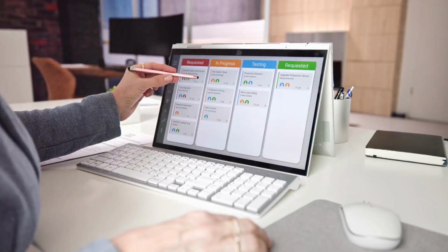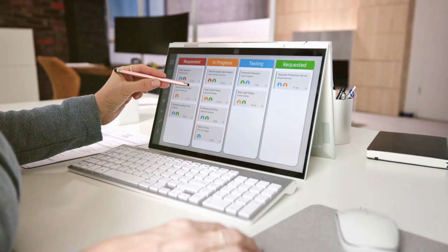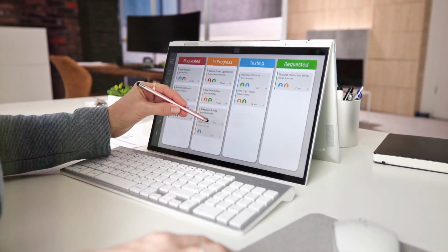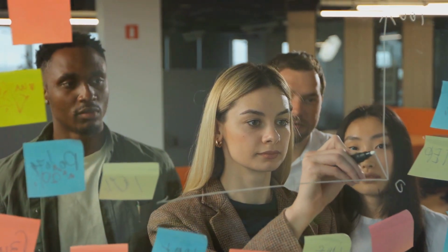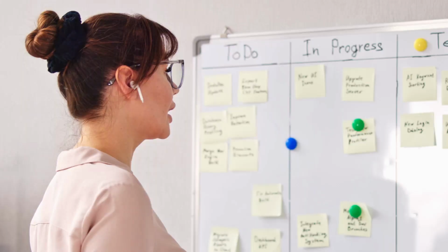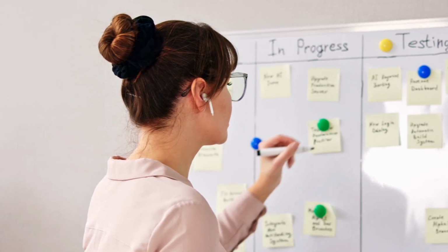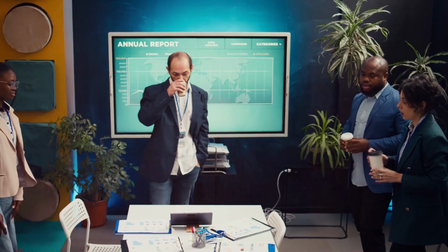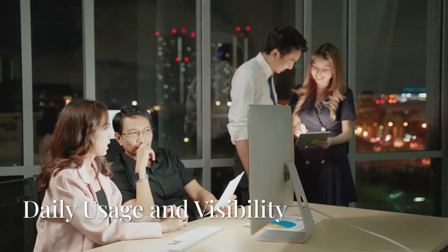Adaptability and change. While the Sprint Backlog is a commitment, it is also adaptive. As the sprint progresses, the team may discover that certain tasks are unnecessary or that additional tasks are required to meet the definition of done. The team is free to reorganize or update the backlog as long as changes align with the sprint goal. However, entirely new product backlog items are not added mid-sprint without careful consideration.